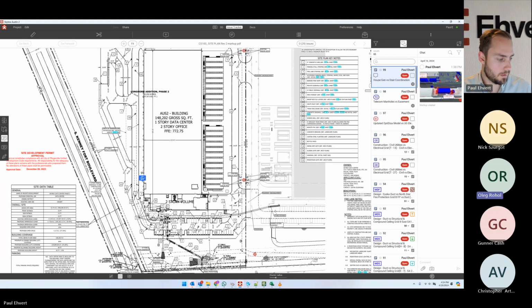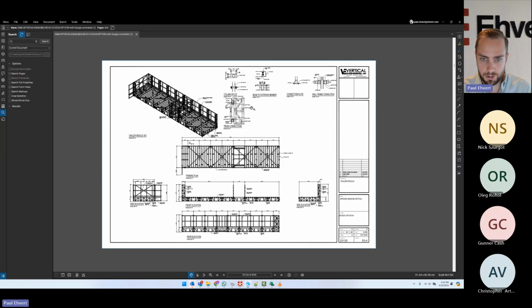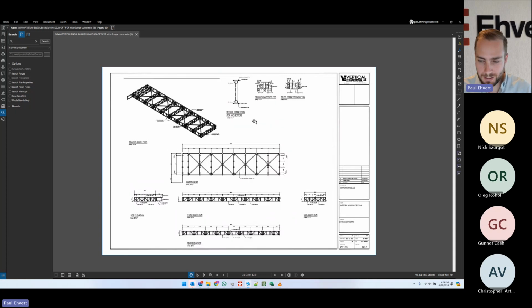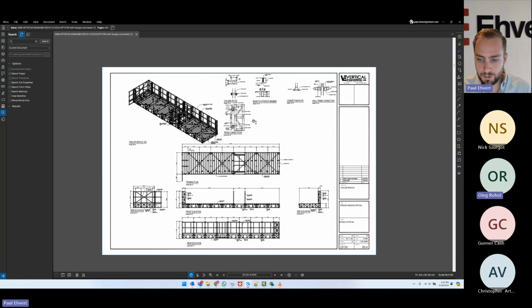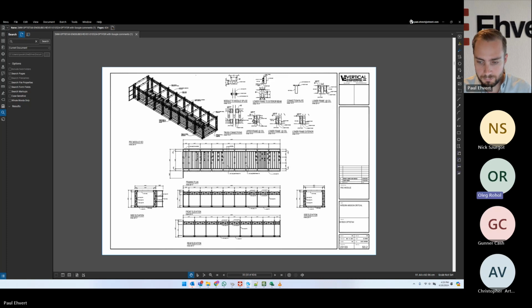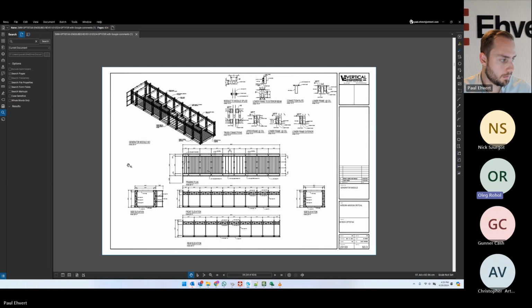Go ahead. So the way they come together, and I was looking at the shop drawings here, you said 3 units. Is each of these its own module that comes in separately? Fuel tank, bracing, PDC, generator, chiller. Each of these stacks you have from bottom to top: first is the fuel tank, next you have bracing, next you have PDC, bracing again, generator, chiller, right? And those 3 groups will be built layer by layer.